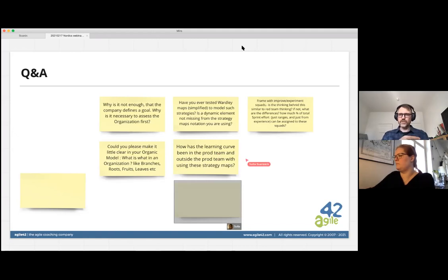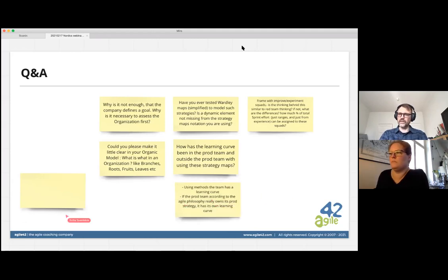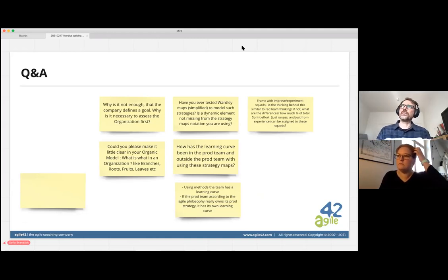Let's say the sponsor says that yes, you can use 20%, for example. That means that after the sprint, 20% of the tasks should be bright red, or whatever color you have. So you should be able to say ahead of time, yes, this sounds reasonable. And afterwards, you should be able to see, are we spending 10% or 30%? And maybe that's not a big problem. Average 20%, whatever, you can adjust as you go. But it's something that should be allowed.